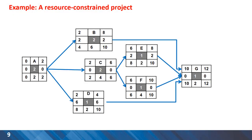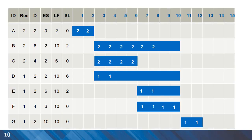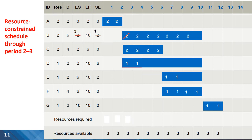Here is an example that we can apply the three priority rules on. You can see here is a small project with seven activities. The completion date for this project is 12 days. You can have the Gantt chart for the project activities with resource requirements marked on each bar — this is a very good visual aid for resource leveling. The available number of resources for this project will be a maximum of three, as illustrated in the bottom row of this table.